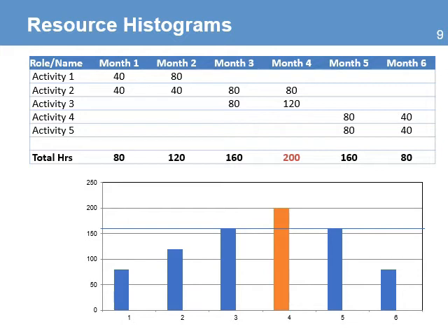That means that you need to assign part of that work to another team member, and the chart will help you identify those team members that have been either over or under allocated to do the work in the project. And you need to act when the workload is not properly balanced. When there is no balance, quality is going to suffer. The project is going to get delayed and team motivation will go down.